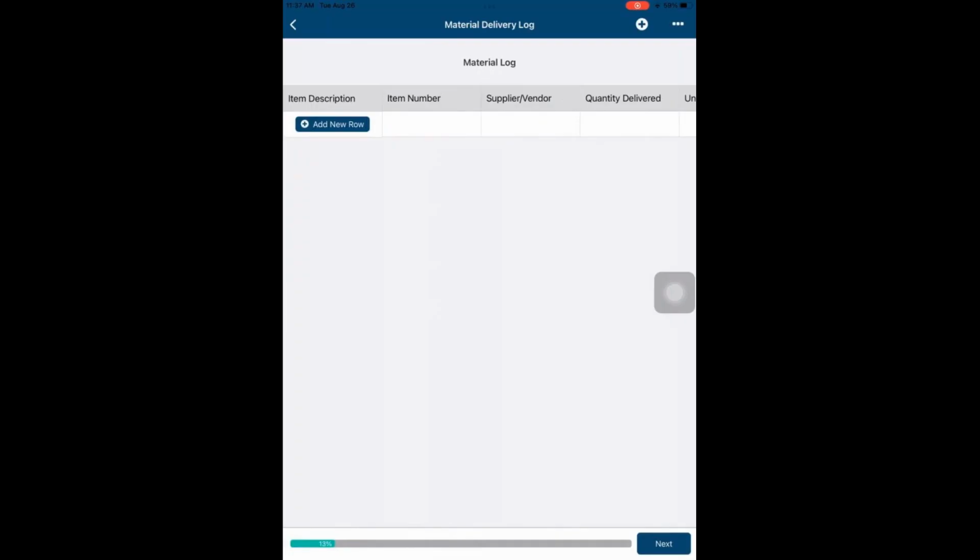Now, today, I'm really just going to be focused on material delivery, but know that this is something we could be doing for equipment usage. What equipment are we using? For how many hours did I use it? What's the unit cost of that equipment? We can have calculations set up that say, if I used an excavator for 4 hours and the hourly cost of that excavator is this amount of money, it's going to tell me what my cost was that day. Again, focused on materials today, but we can do time and equipment, all that good stuff. It will look very similar to this.